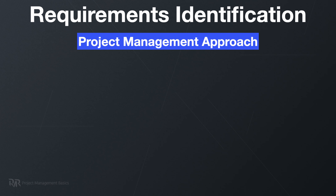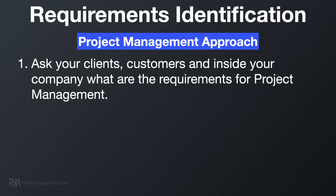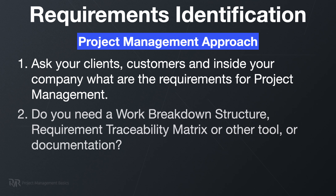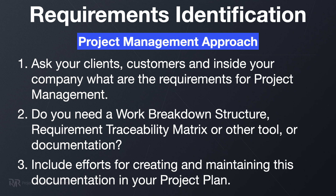We talked about functional requirements and non-functional requirements, but always keep in mind there are also requirements to your project management approach. You need to ask clients, customers, and inside your company what the requirements to project management are. Do you need to create a work breakdown structure? Do you need to create a requirements traceability matrix? Formally creating and maintaining any piece of this documentation requires effort, and you should include this in your project plan.